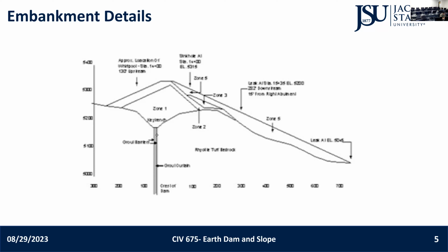Let's say you build something, then you have to commission it, right? So how do you do the commissioning? You fill it up, you monitor it. Then you fill it up, you monitor it. Then you fill it up, you monitor it. If you just build it, you don't know how it's performing, right?